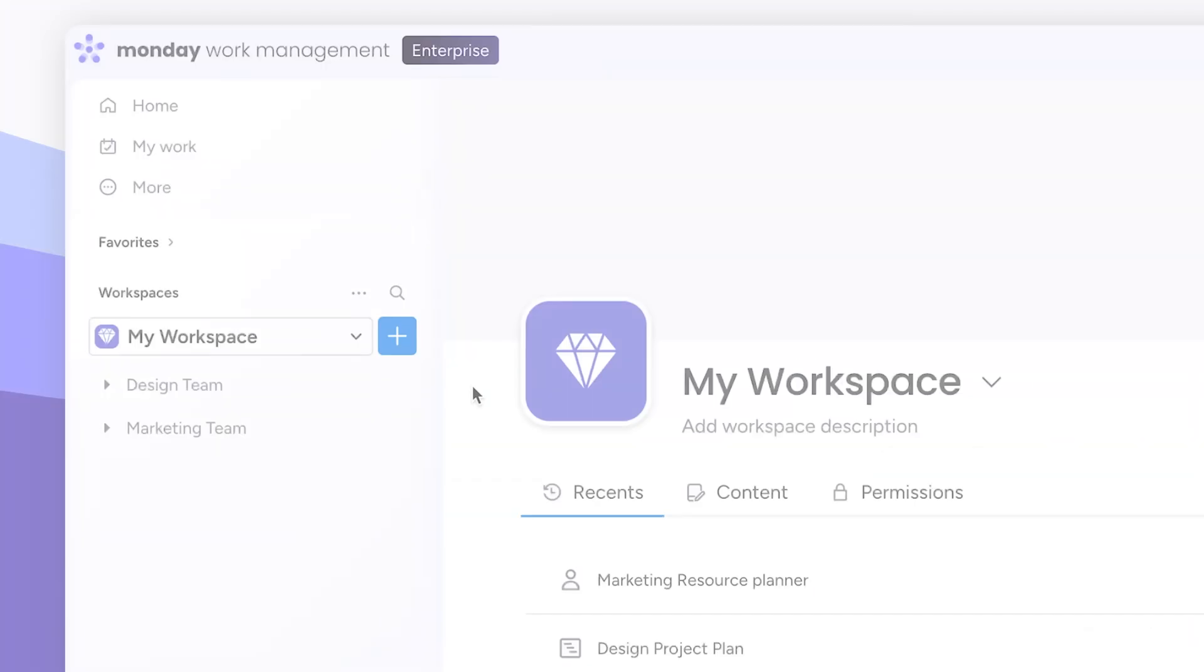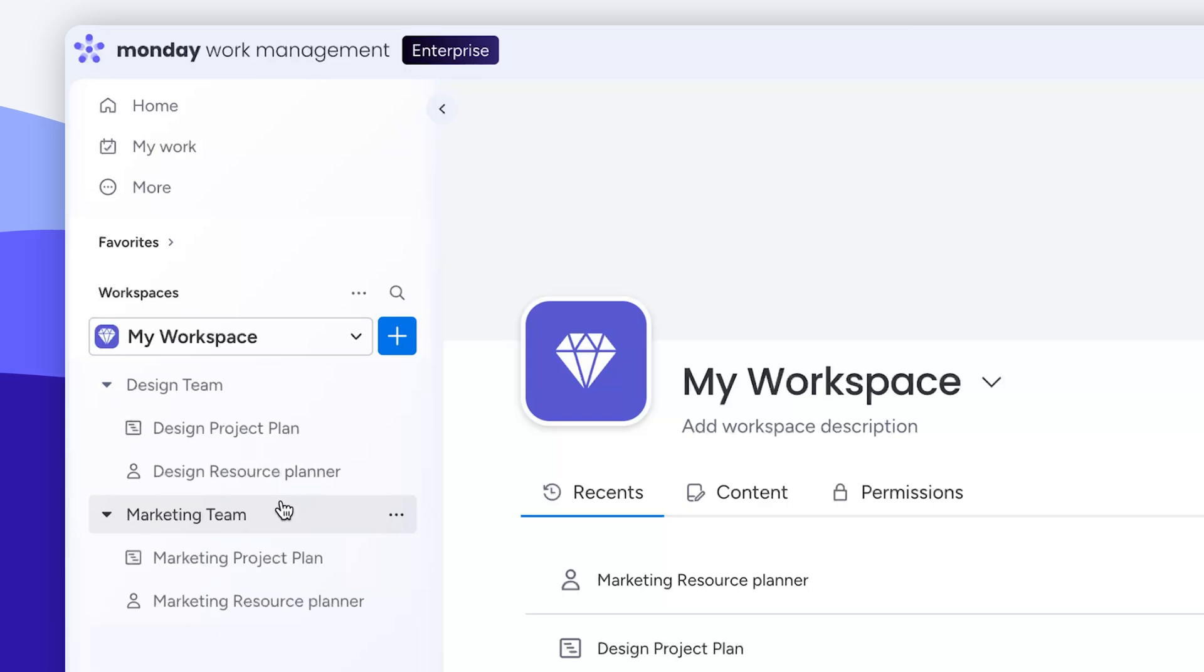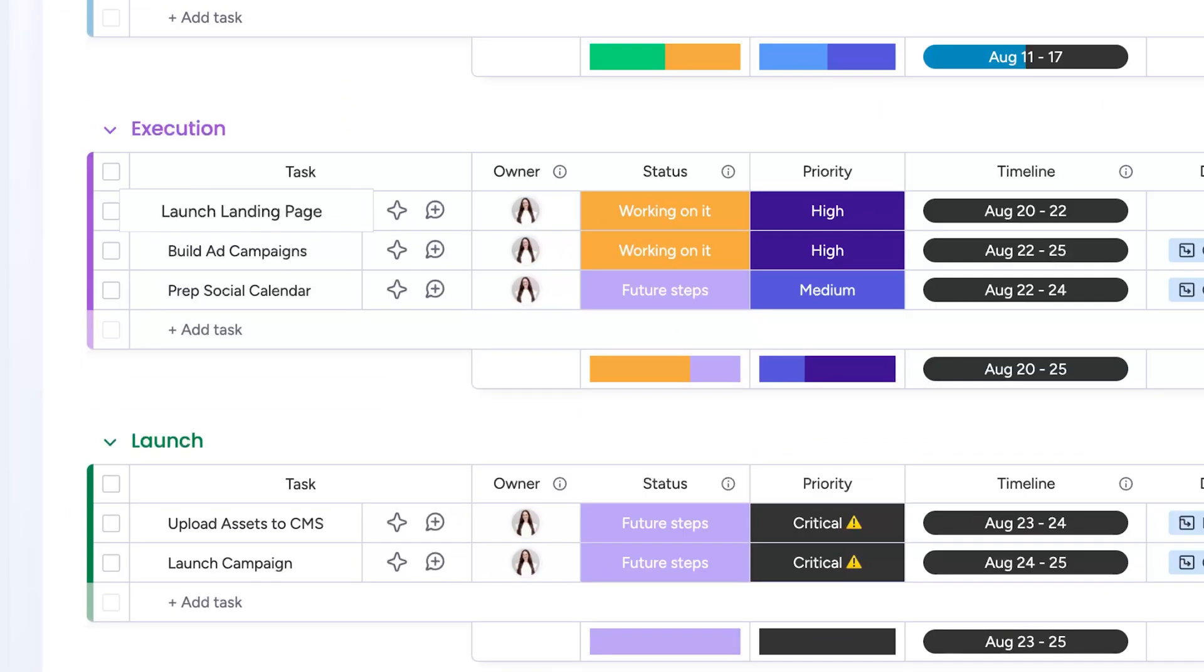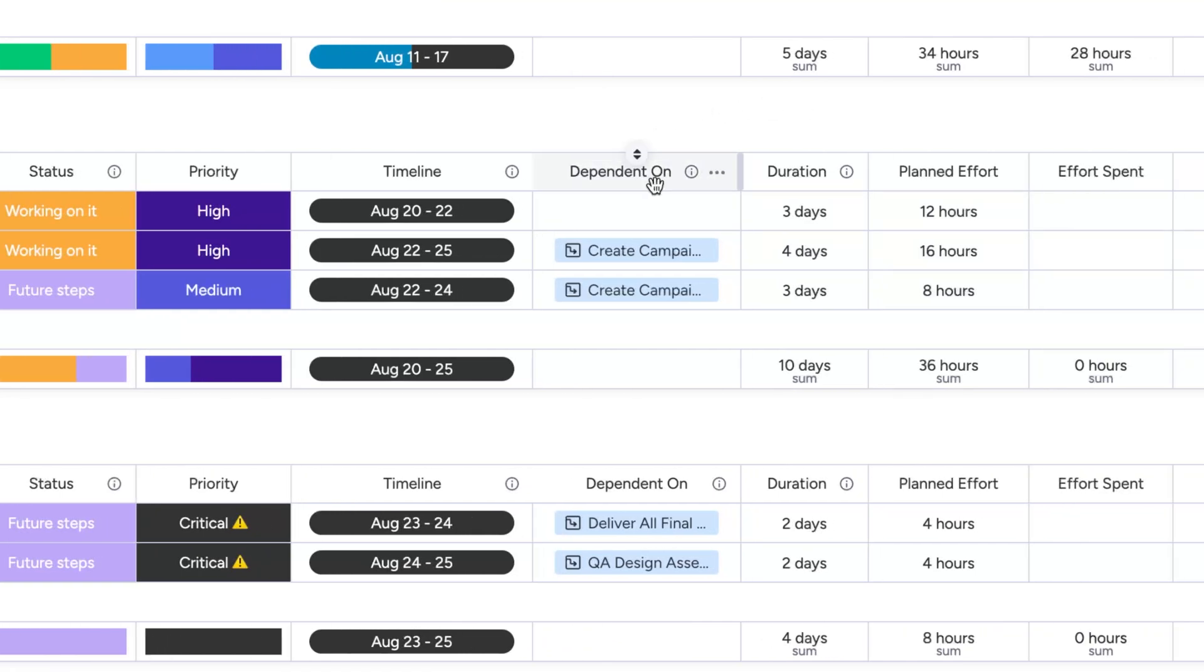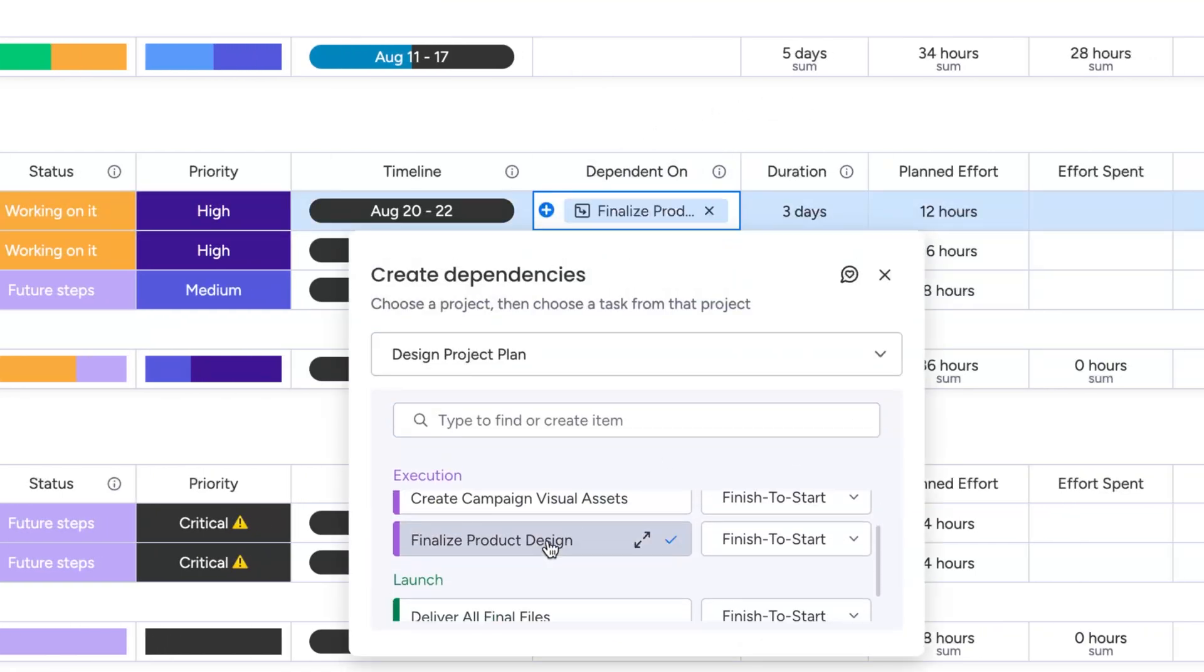Okay, let's say you're launching a new product. Your design team handles the creative assets, while your marketing team manages the campaign timeline. By linking the launch landing page task on the marketing board to finalize product design on the design board, you can ensure one doesn't move forward without the other.